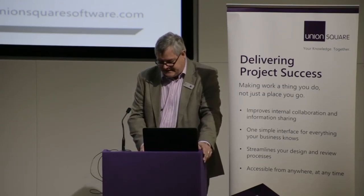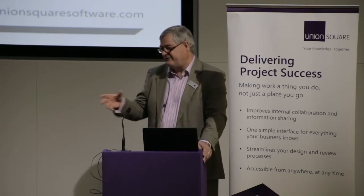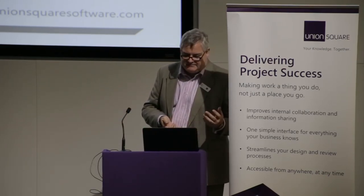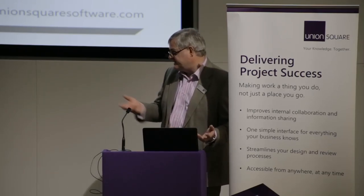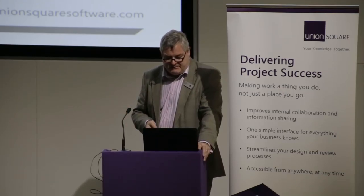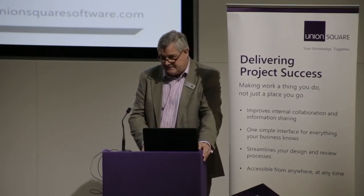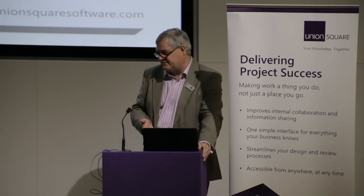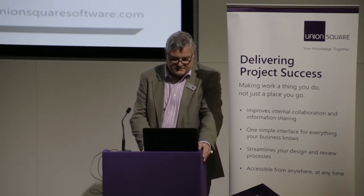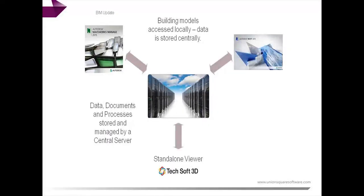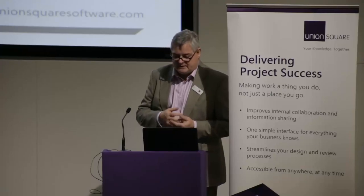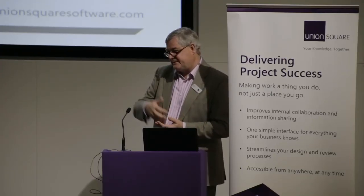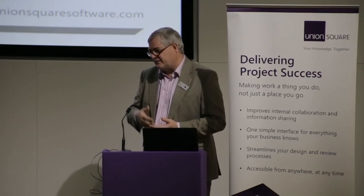Putting everything in the model results in huge models that have to be distributed, and that doesn't work. We want to keep the model small — storing just the minimum geometric information in the model and everything else elsewhere: specifications, O&M, processes, RFIs raised in relationship to elements in a model. For distribution, everyone needs an up-to-date version. We have document distribution in Union Square, the extranet which will be available this year, and traditional methods like Dropbox — though those aren't auditable and lack a full audit trail.